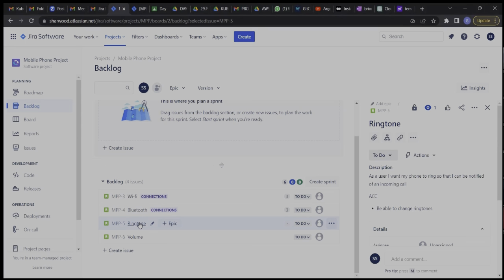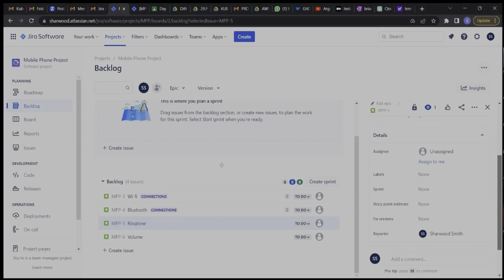So now we are linking the issues, right? Let's assume that we are in our sprint planning already. The backlog refinement, we've already done. Everybody understood the requirements, or what is required of the story. Because we have understood what is required, we are able to estimate, right? If I see something has a lot of requirements, it tells me it's going to take me more time and effort, so it will prompt me to give a higher estimate, right? That is why we had that conversation before we start putting in the estimate.